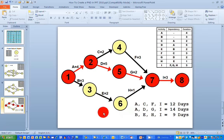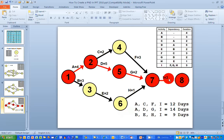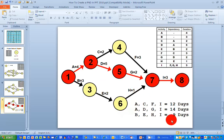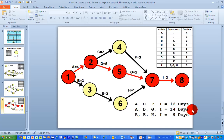Moving on to the last slide, I need to identify the critical path through my project network diagram. There are three paths: one through activities A, C, F, and I; a second through A, D, G, and I; and a third through B, E, H, and I. Adding up all the durations, the second path — A, D, G, I — adds up to 14 days, highlighted in red, and this is my critical path. As a project manager, this is the path I would manage most closely. This also tells me that the overall duration of the project is 14 days, because that's the longest path through the project.